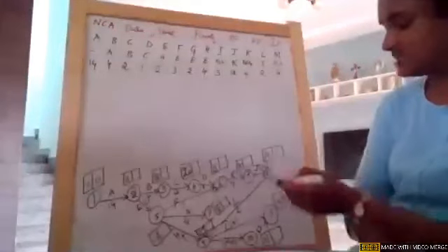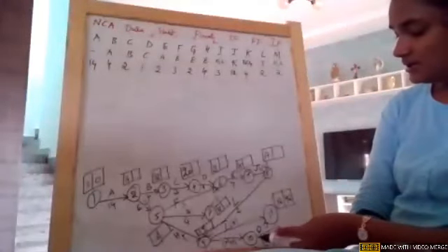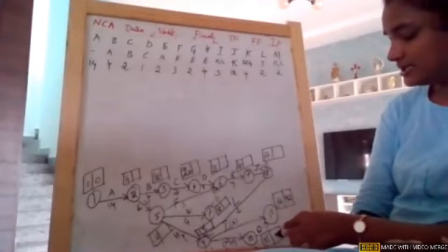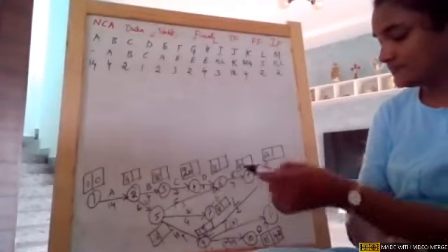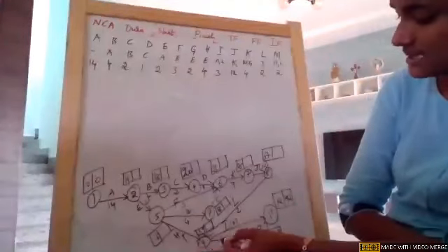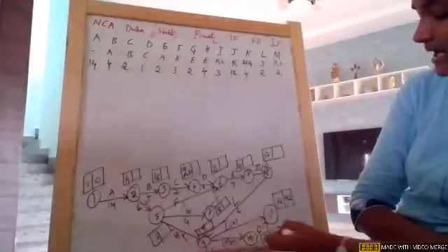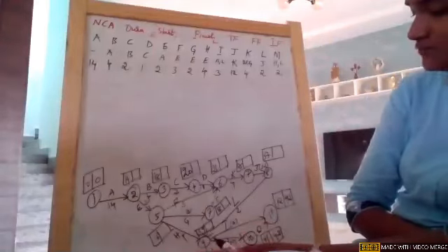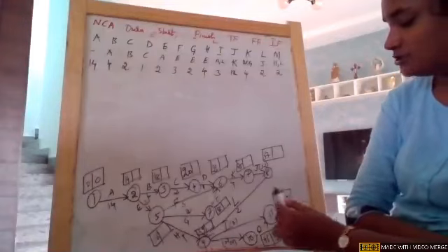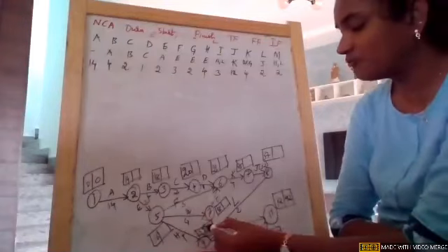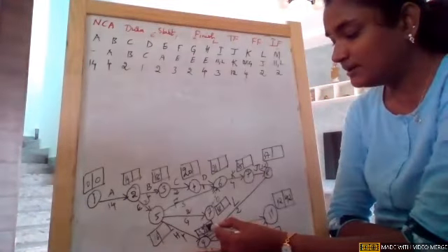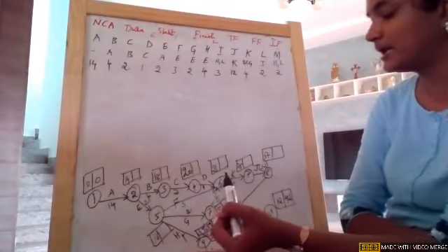Now go in reverse for the latest times. If I go to node 10, there is a single tail. So 42 minus 0, it is 42 only. Now come to node 9. Node 9 has 2 tails, girls. See how we do it, we take the minimum value. One value is 42 minus 2, which is 40. The other tail is 42 minus 3, which is 39. So 39 and 40 are the 2 times we got at node 9. The minimum one we need to write, which is 39.